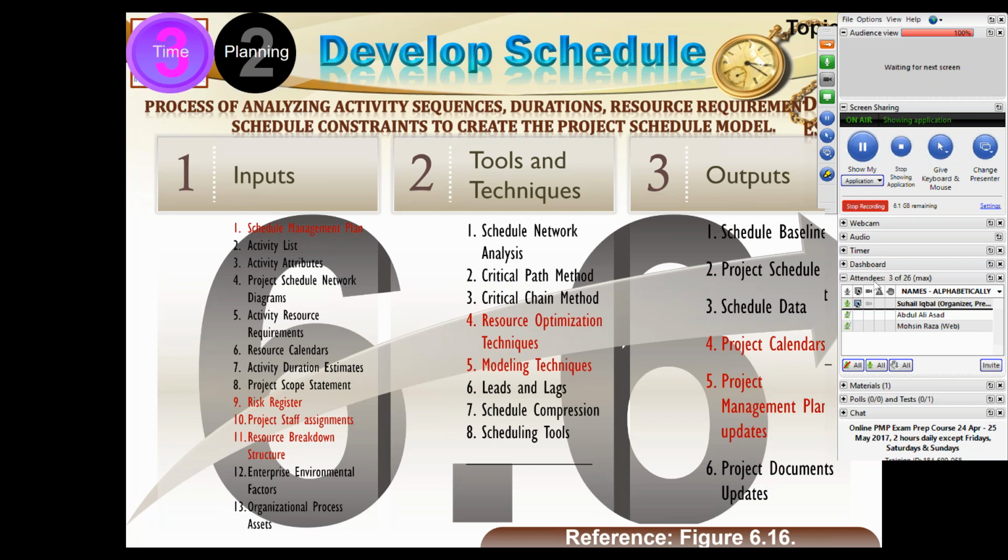Okay, sir. You could have built in some reserve, but we all know how much reserve has been kept in it. But we don't know how much padding you have put into it. And padding has no justification. You did not provide a justification, you just added your allowance into it. So normally the figure which reaches the project manager is inflated due to padding, and it is so much inflated that it will baffle you. A 2-day activity in 10 days and nobody noticed it.